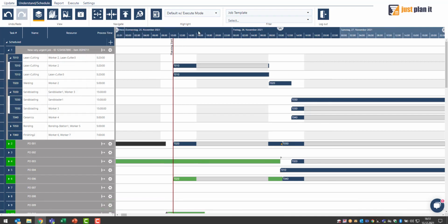And as a matter of fact, just set the baseline when you are fully sure that the schedule, as you see it at that dedicated point of time, is really mirroring what you want to freeze in as an initial plan. And with that B, you are definitely reminded if something is missing in that regard.